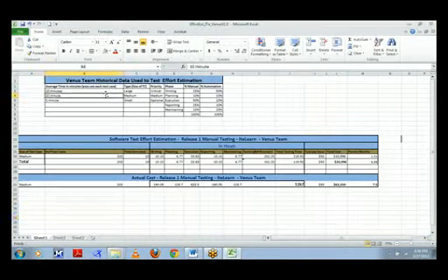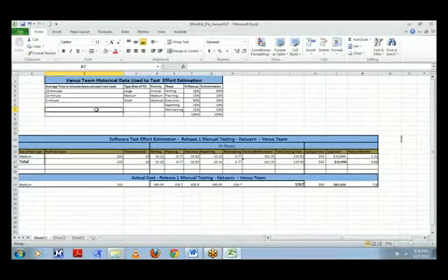These are the historical data that we have collected for some time. We have some data which shows how much time it takes to execute large, medium, and small test cases, and within the test life cycle, what percentage of the time each activity will take, such as planning takes 10% of the entire test life cycle, and execution takes about 50%.